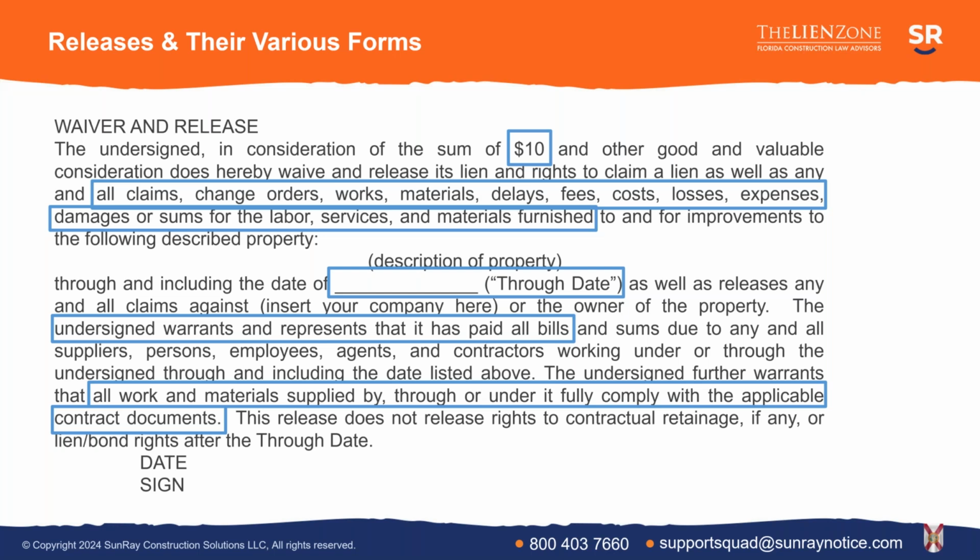So notice that when you actually read releases that have lots of words on them, you're probably giving up more than just your lien rights, and you're probably making affirmative representations that you've paid your bills, that you're going to indemnify people to the extent you haven't paid your bills, that you've done all the work consistent with the plans and specifications. So just know that those things are things that you are affirming when you sign releases that have all of this language in it.